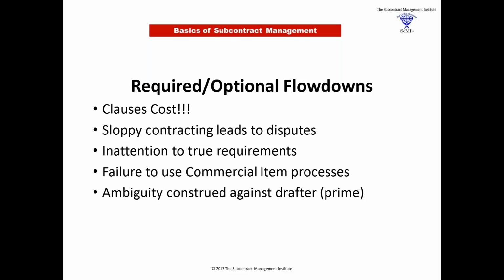So we had done a compliance matrix on this abomination they had handed us. And when they gave us that little lecture about, well, they're all standard clauses and it's all boilerplate and we all comply with them and blah, blah, blah, I said, okay, I get that. I understand. And what you're saying is pretty much how practice works. But I do have one question. We looked at all the clauses you put in here, and are you aware that you included 7 different inspection and acceptance clauses? Oh, no, we wouldn't do that. I said, yeah, you did. And because we had constructed a compliance matrix, we were able to show them. Here were the 7 clauses.